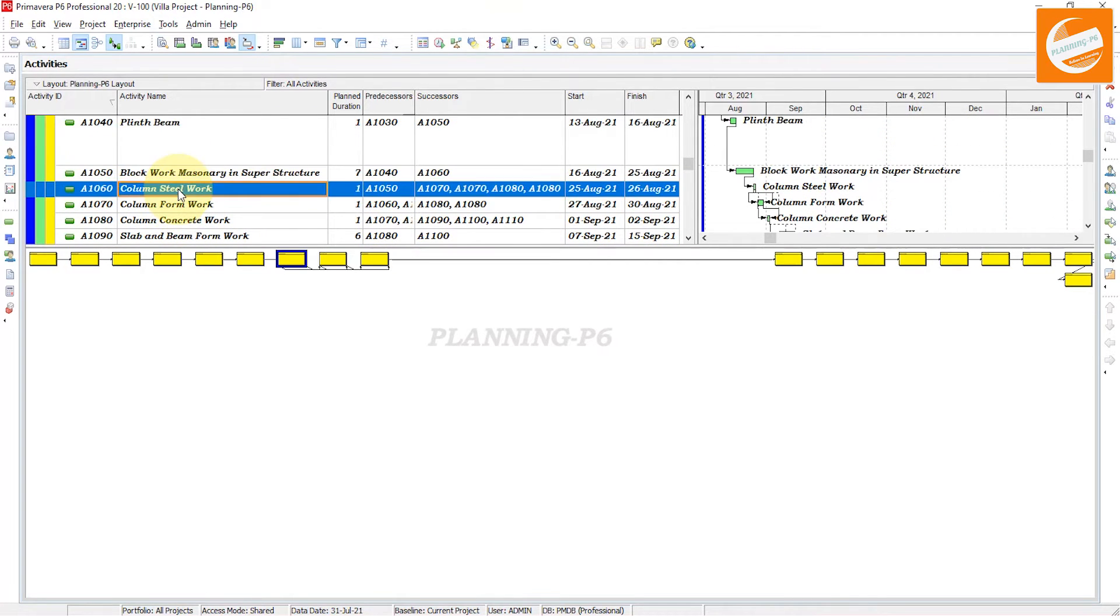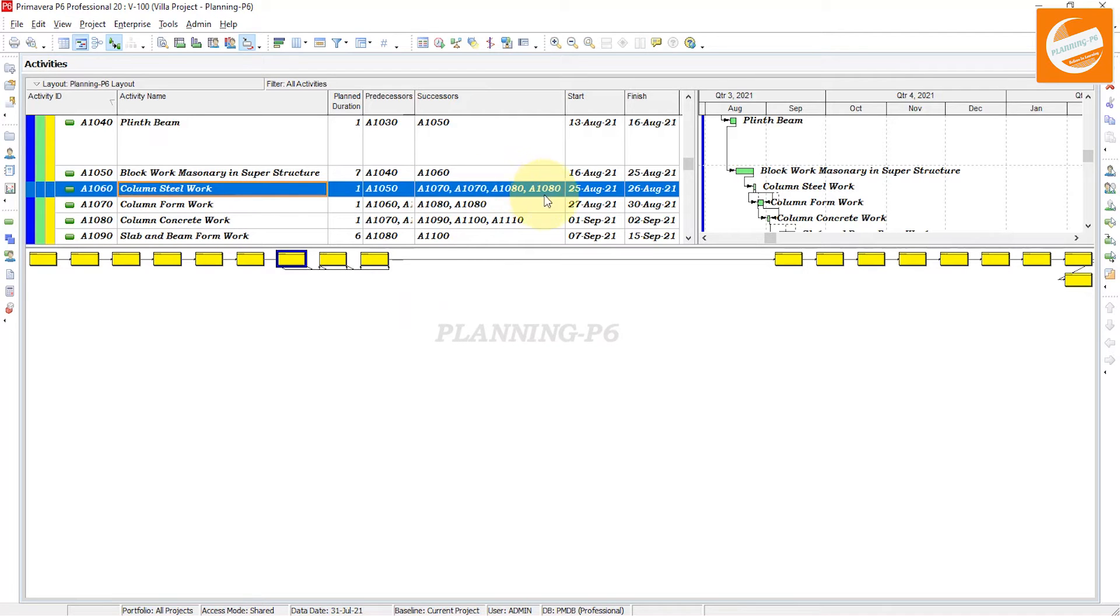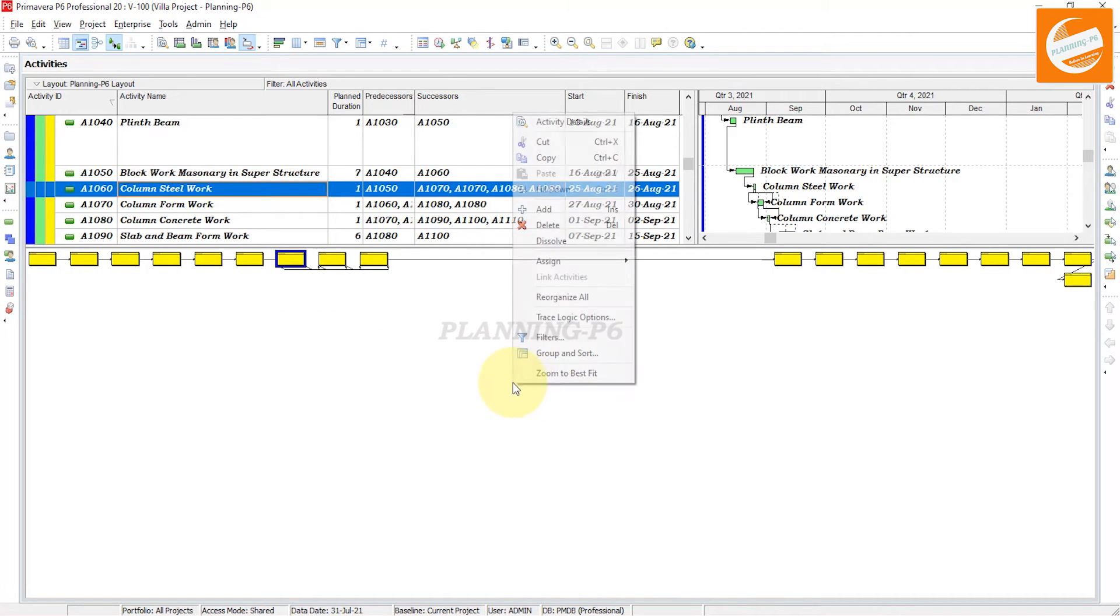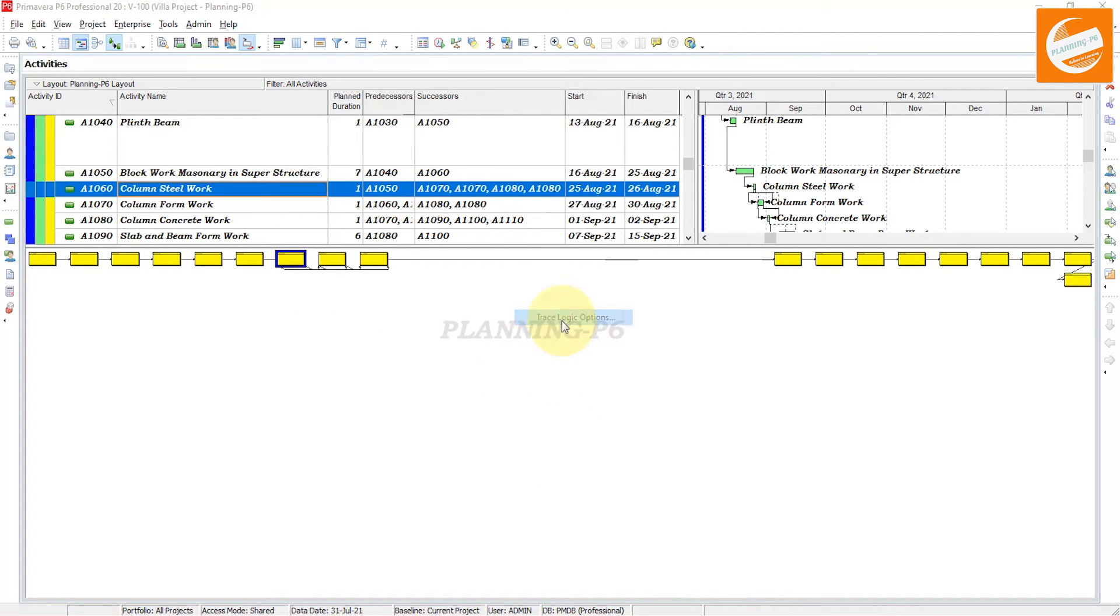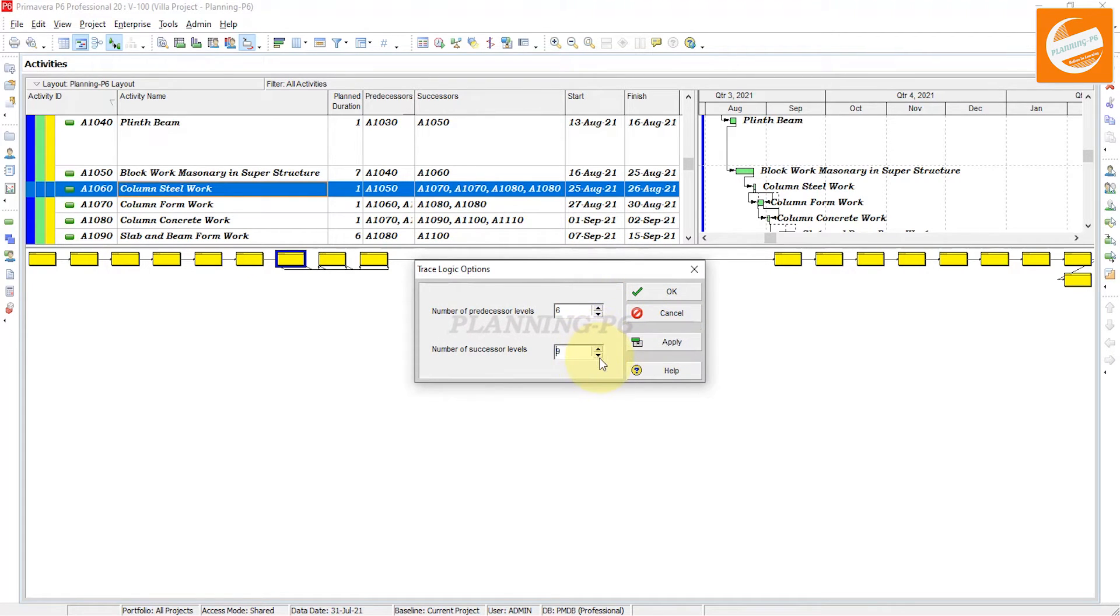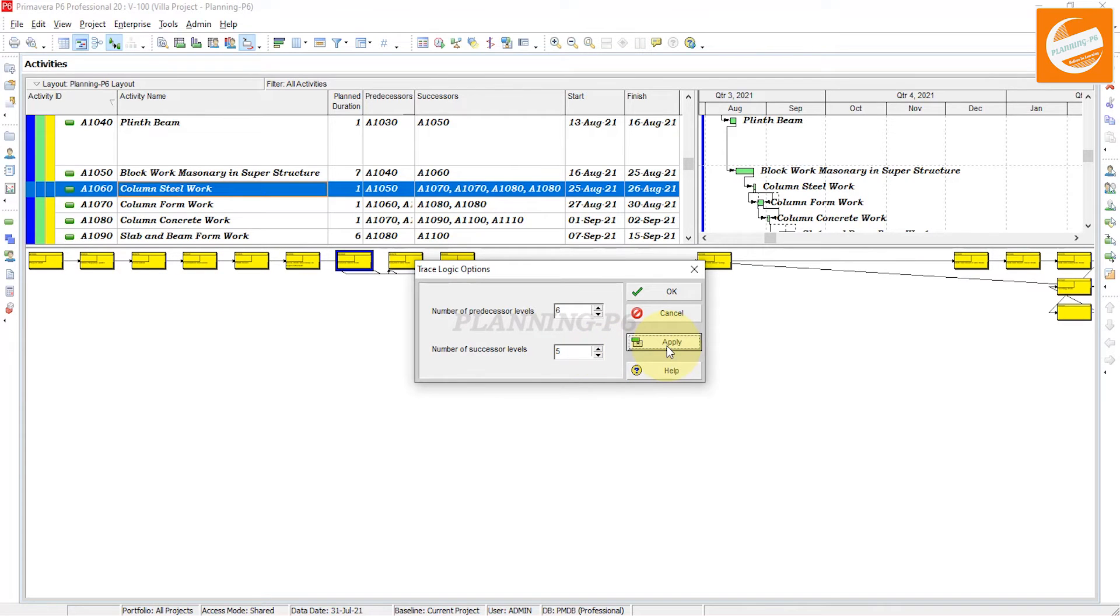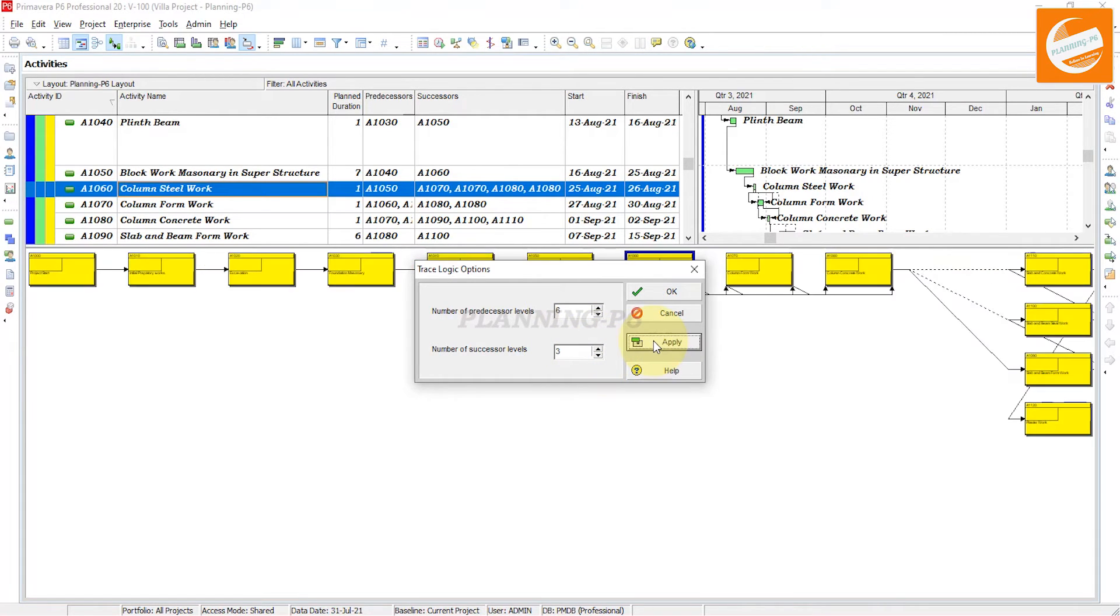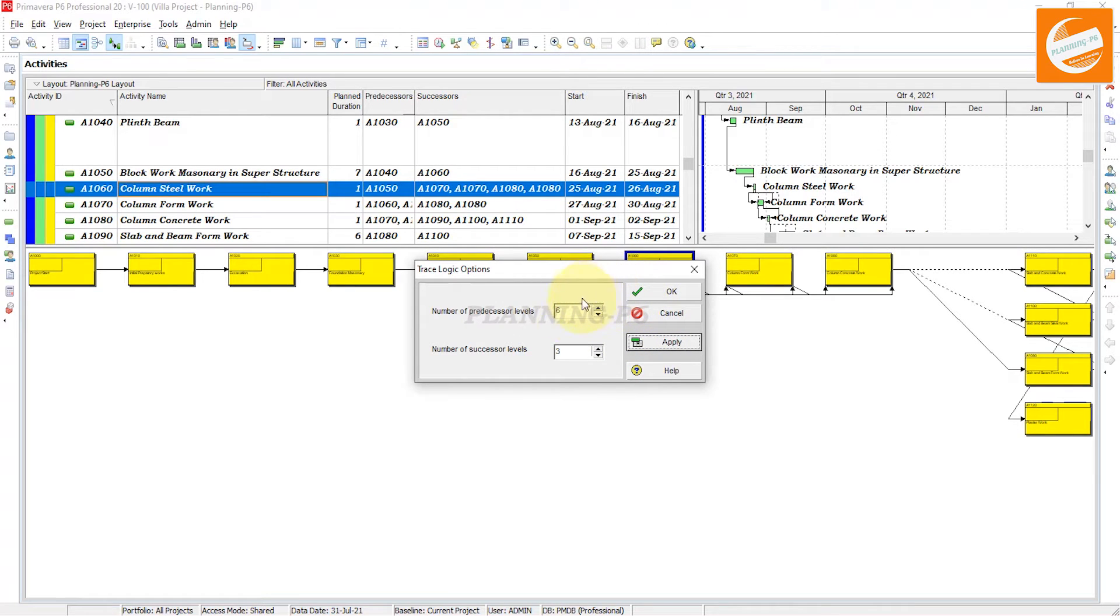Click on it, and if you want to see the successor of this activity, go to the options and minimize it. Apply successor level up to 5.